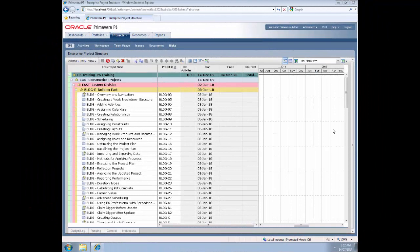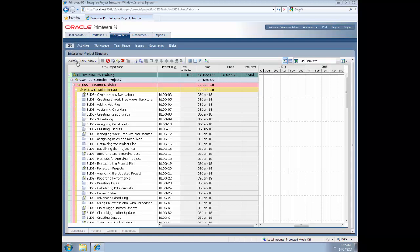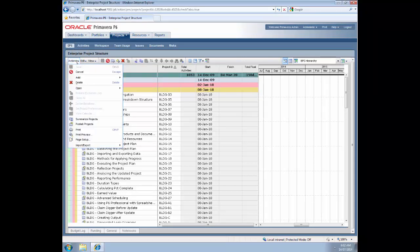Right, here we are in P6 web. You can see the main navigation tabs along the top left hand side here. We're in the projects tab at the moment. In the sub-tabs we're on the EPS sub-tab. We're about to start creating our new project. To do that we go to the actions drop-down and say add, add a project.